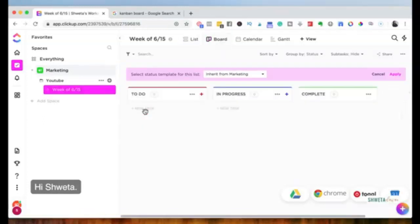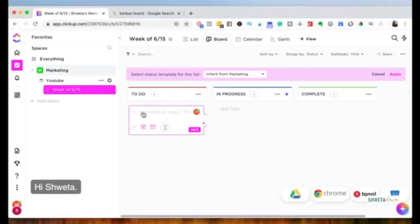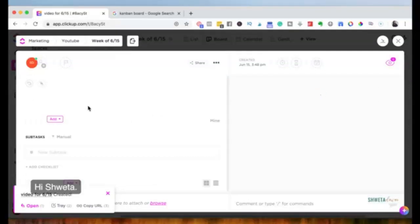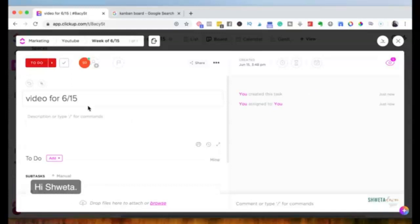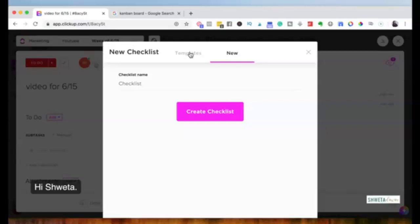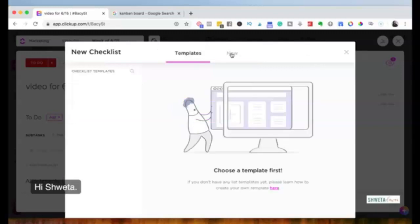Within this list I can start putting in tasks. In the board view, under 'To Do,' I'll create a task: 'Video for 6/15.' Once I save it, I can open the task and add multiple checklists — for example a YouTube workflow checklist covering keyword research, the title, scripting, recording, adding an intro, adding an outro, using tags, and so on.